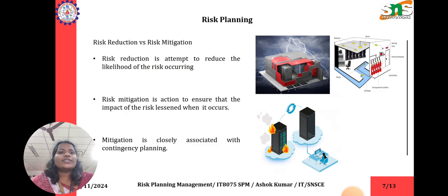Risk reduction versus risk mitigation. Risk reduction is action to reduce the likelihood of the risk occurring. Risk mitigation is action to ensure that the impact of the risk is lessened when it occurs. Mitigation is closely associated with contingency planning.